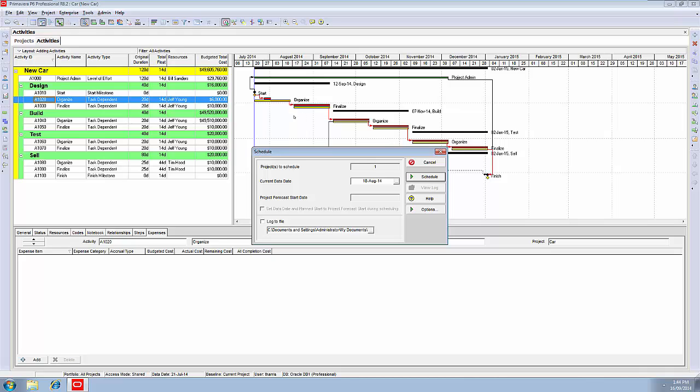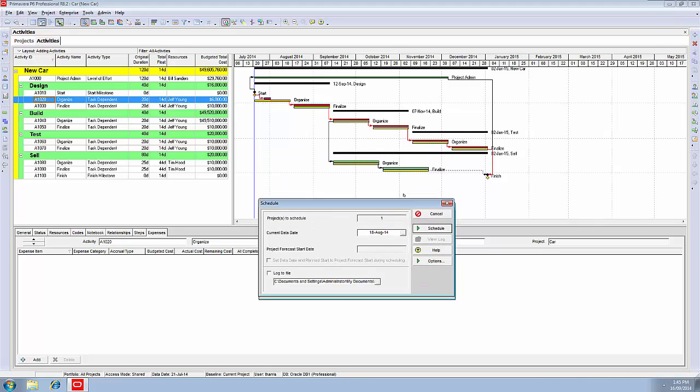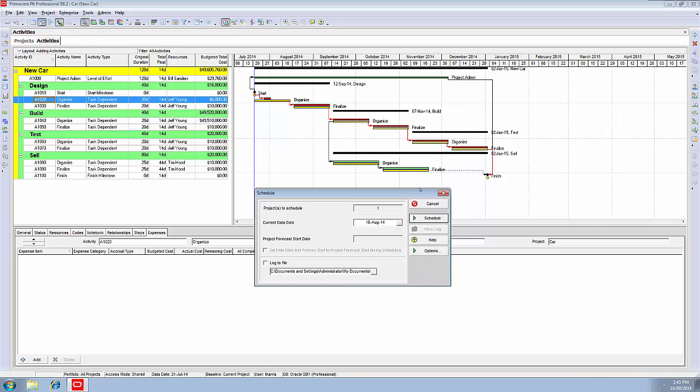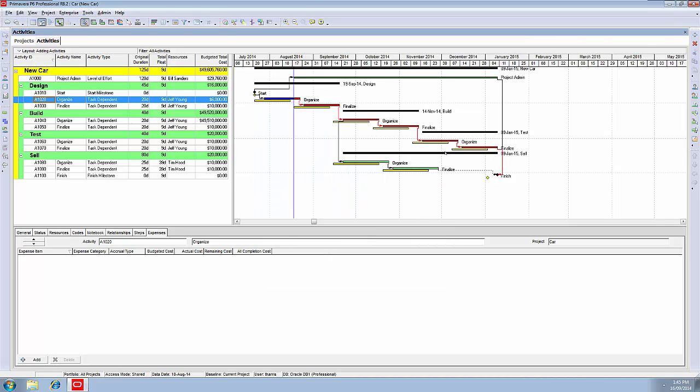When we press schedule, the computer will do a forward pass through all the activities, working out the earliest every activity can start and finish. When it gets to the end, it'll turn around, do a backward pass, working out the latest that every activity can start and finish. We schedule. Bing. The computer does it for us. And now, what we see in the Gantt chart is correct.